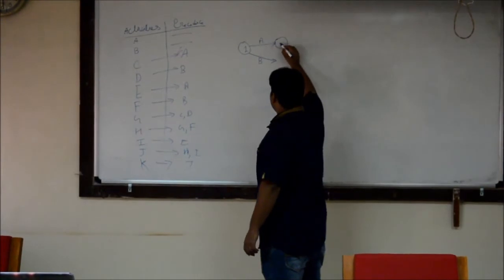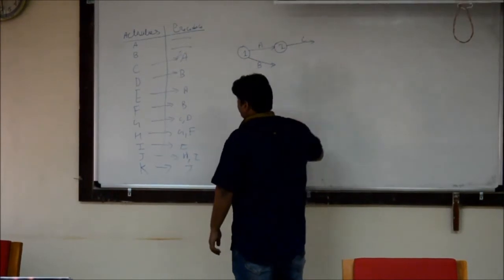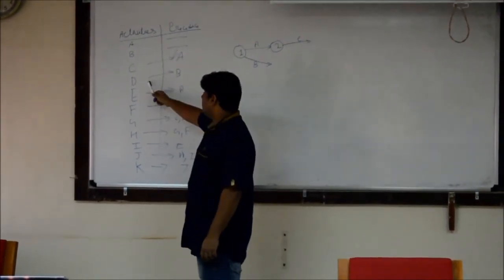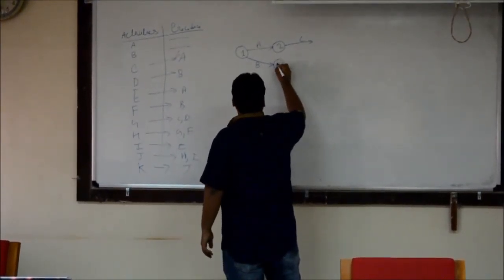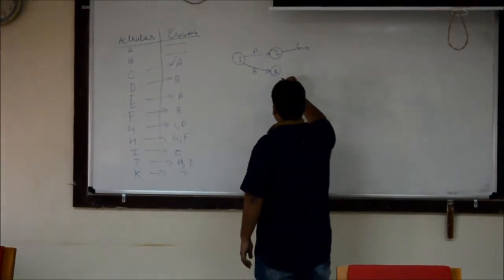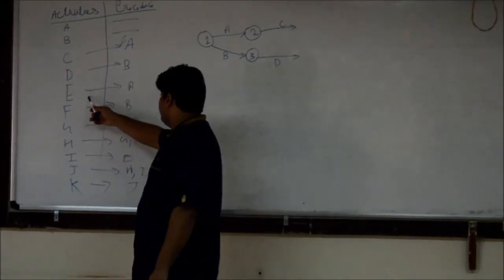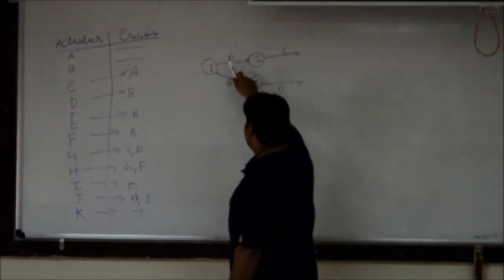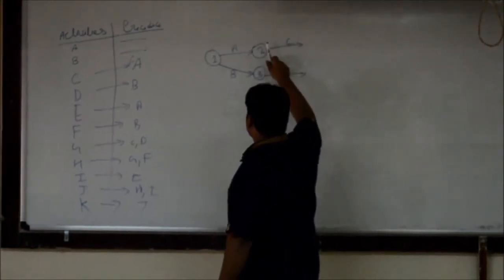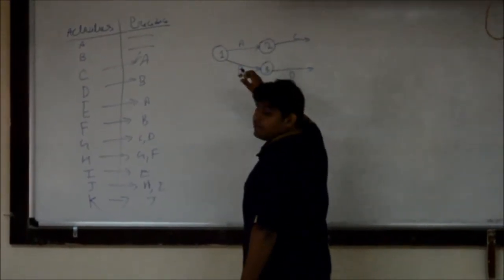So one event occurs, we will number it as 2. After this, activity C occurs. Now we will go for activity D. It occurs when activity B is already completed. So for this we have to create one event and we will number it as event 3, and after this activity D occurs. For activity E, A should be completed. So we have to make activity E after event 2 only, because before this event only activity A was completed. No other activity was completed before this event.